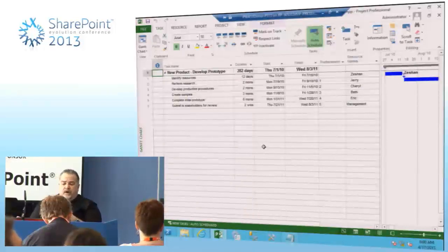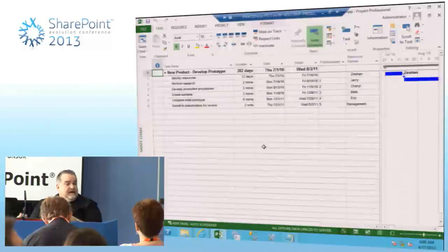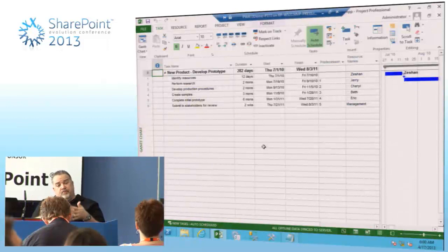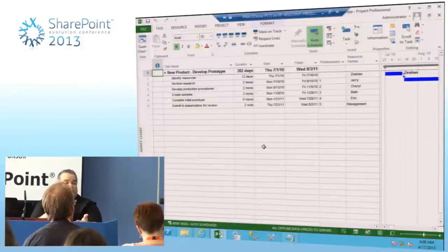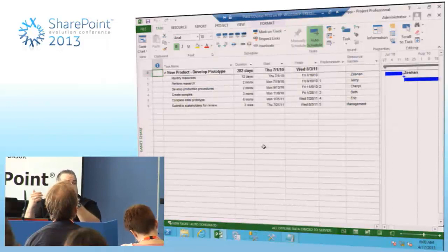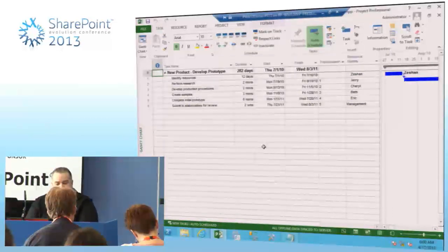And the reason why you want to import it instead of saving it as a new project is I potentially want to avoid a problem with the mapping on the resources. Like this file has resources already assigned to it. The last thing I want to do is to redo all that information. I mean, this is 3 tasks, but what if you had 6 tasks, what if you had 600? The last thing you want to do is re-establish all that information.